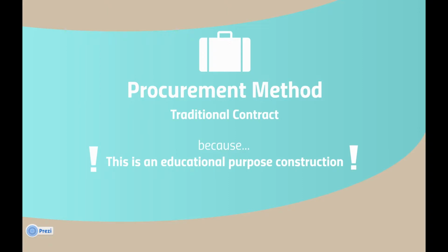For the traditional contract, we have in-house consultants and we are the employers. The contractor should not have too much control in the project, as we decide the design and we know how to achieve the objective better than them. So design-build, construction management or other management contracts should not be adopted, and we use the fixed price, drawings and specification, and traditional contract in our procurement method.